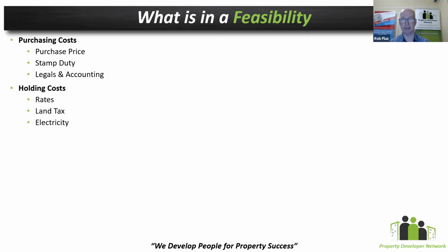Maybe you've bought an existing complex. You might have some body corporate fees because you bought an entire complex you're going to knock down. All of those things add up as you go, and the longer the project takes, the more that's going to impact. There's also elements like land tax that are very subjective to the specific date that you actually own the property at.